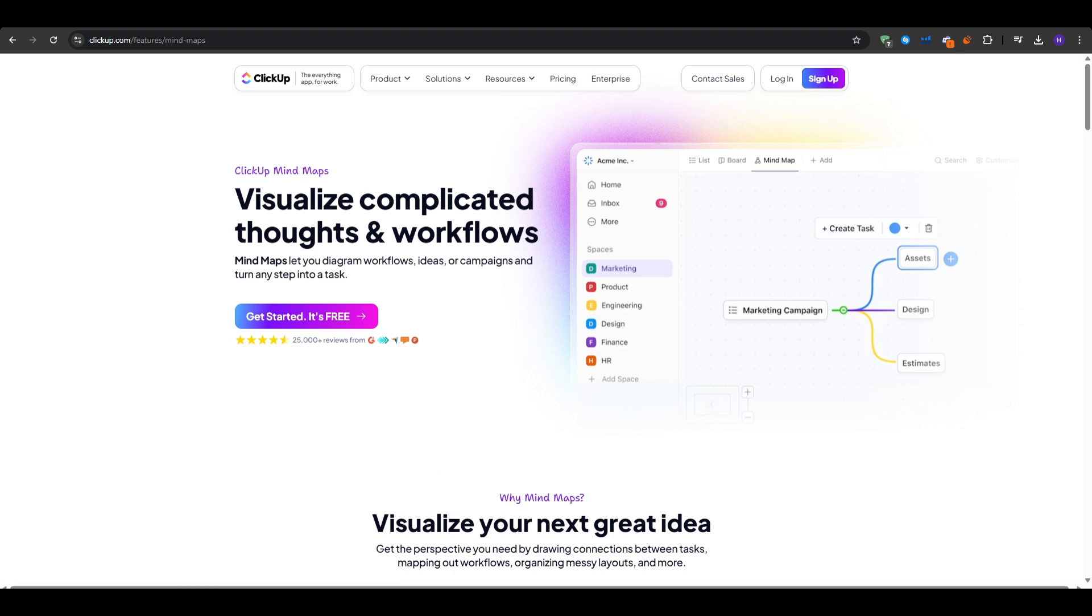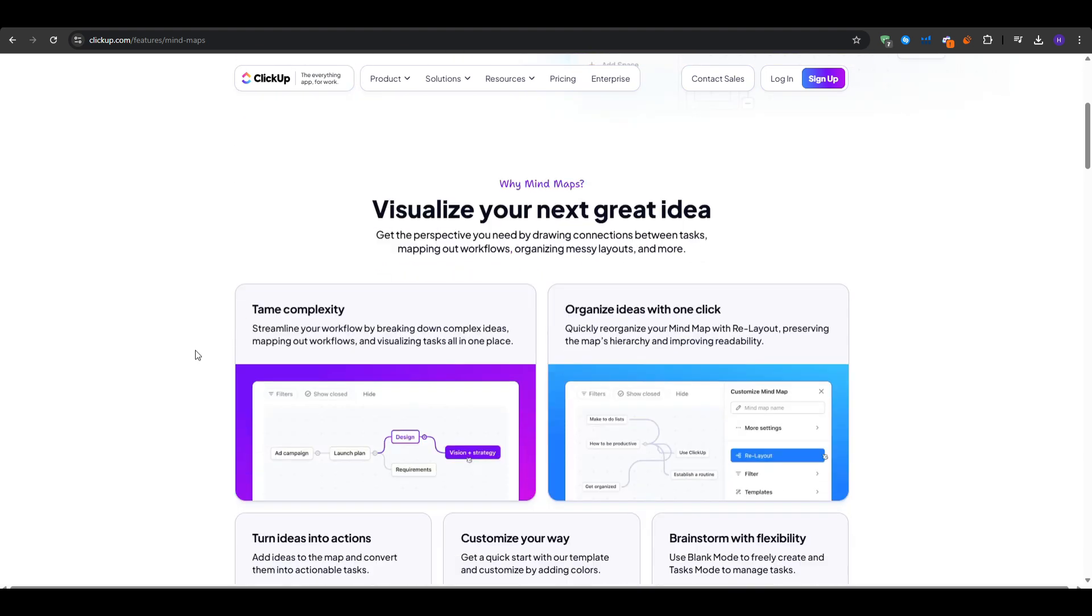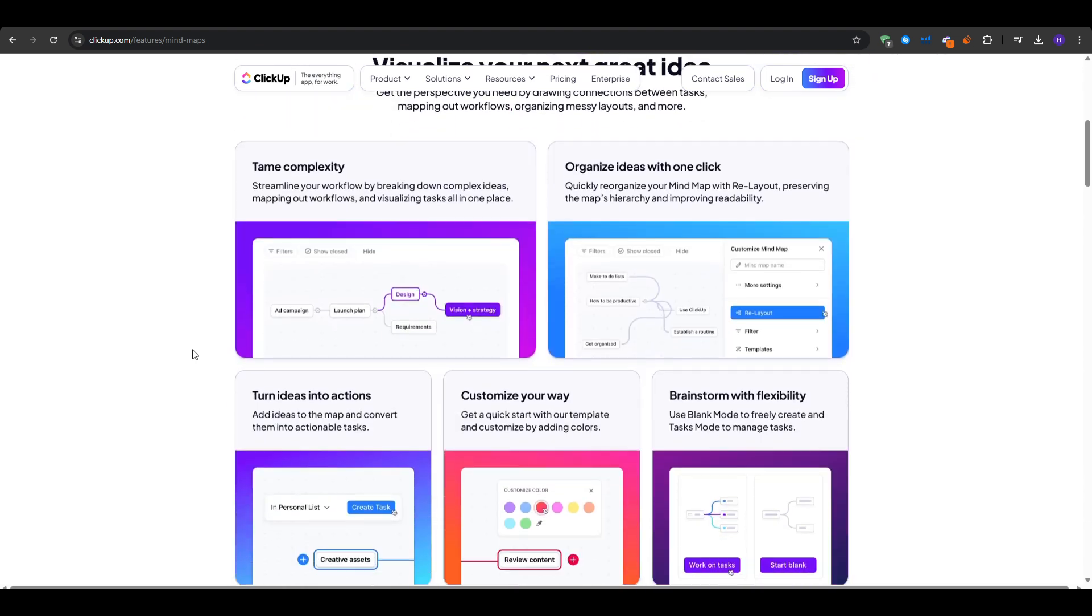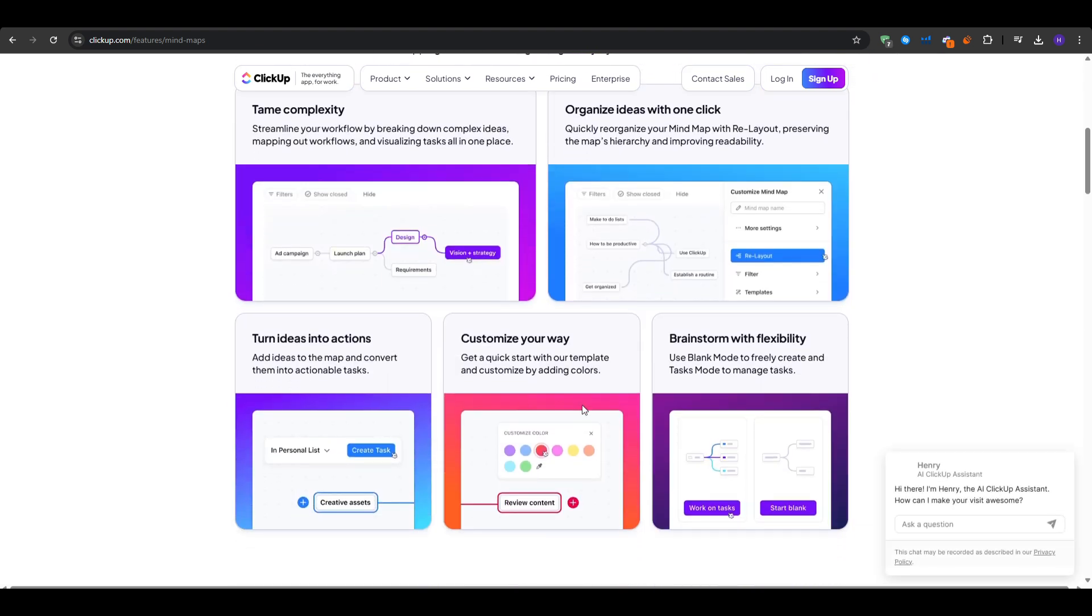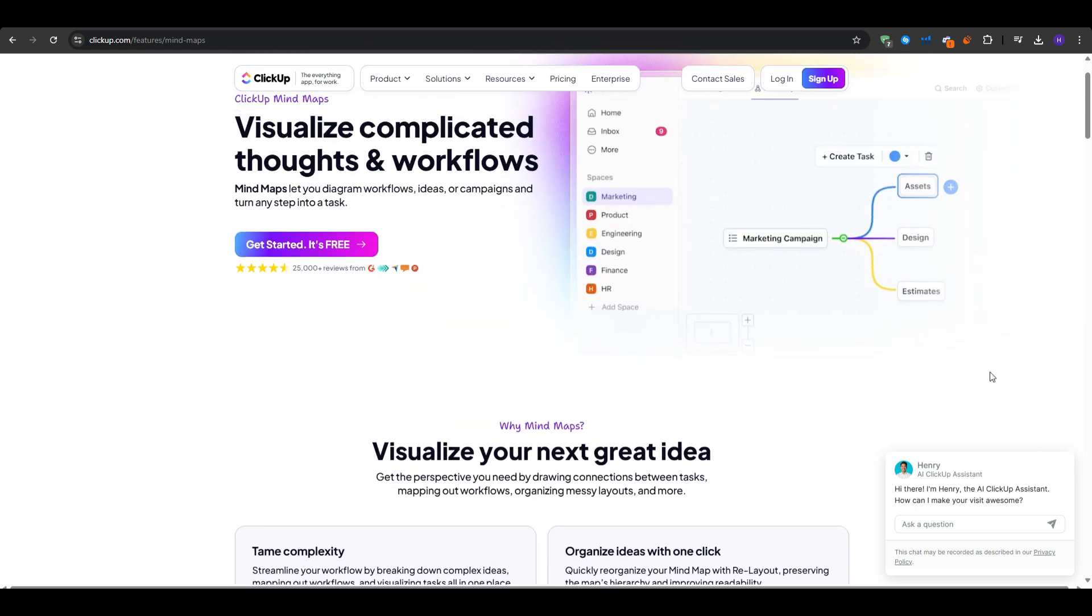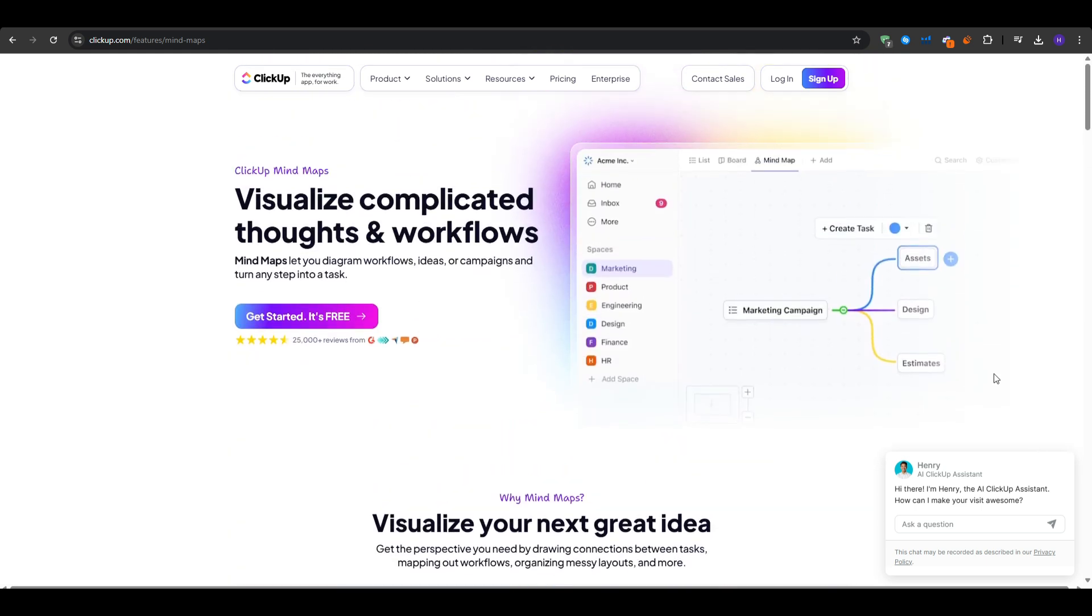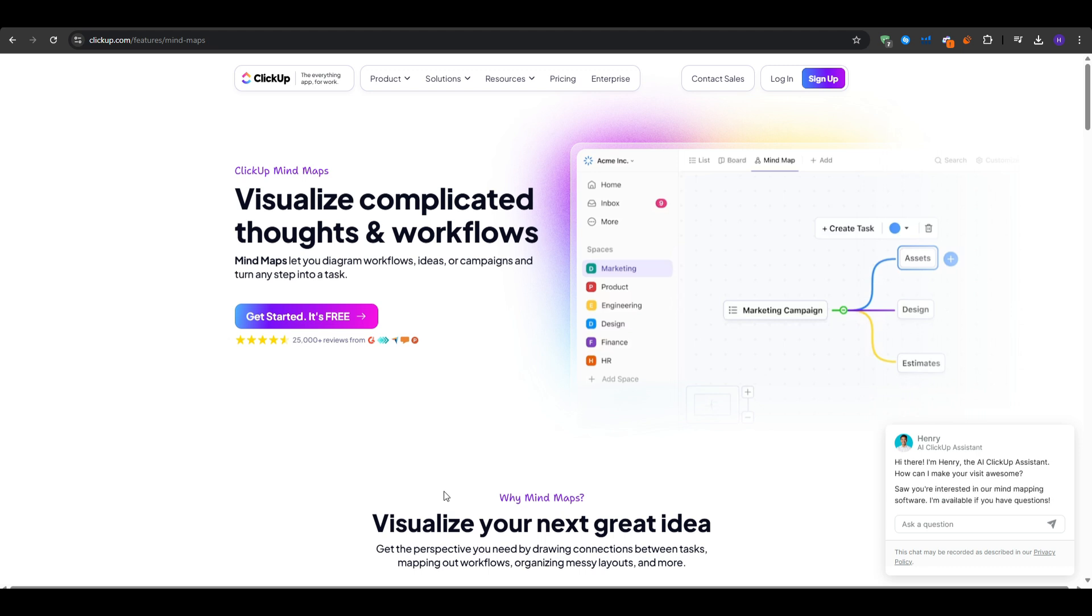So, in other words, you can visually outline ideas and then convert specific nodes into tasks assigned to different people. Some of the key features include a task integration, so when you create or link a mind map node to a task, any changes or updates in the mind map reflect in your main project board. This synergy helps reduce duplication.